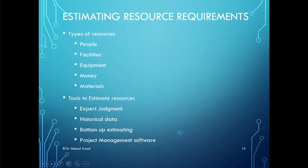To estimate resources needed, we must clarify that resources does not mean humans only. Resources include people, facilities, equipment, money, and materials. To estimate resources we need one or more of the following tools: expert judgment, historical data, bottom-up estimating, and project management software.